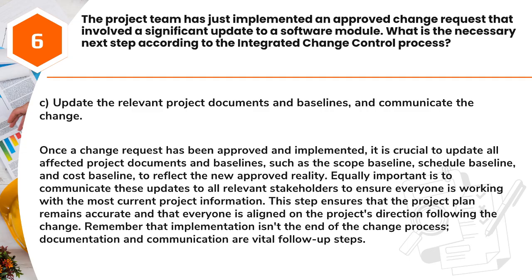Answer: C. Update the relevant project documents and baselines, and communicate the change. Once a change request has been approved and implemented, it is crucial to update all affected project documents and baselines, such as the scope baseline, schedule baseline, and cost baseline, to reflect the new approved reality.